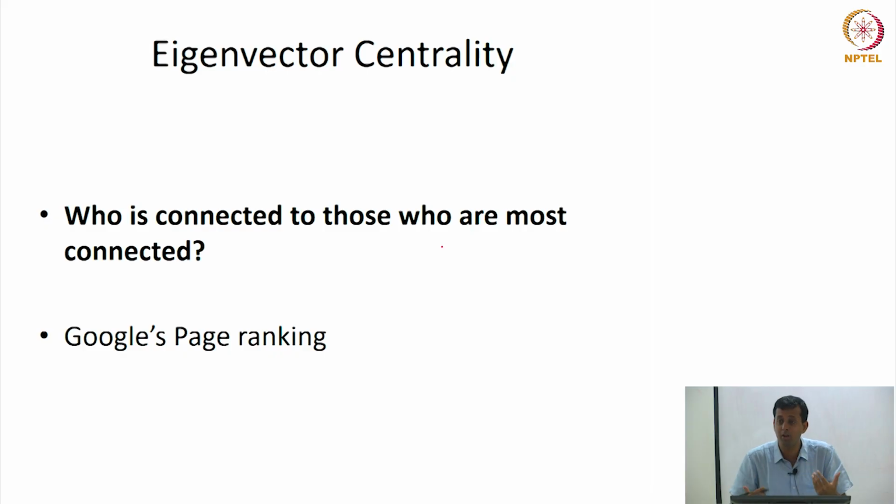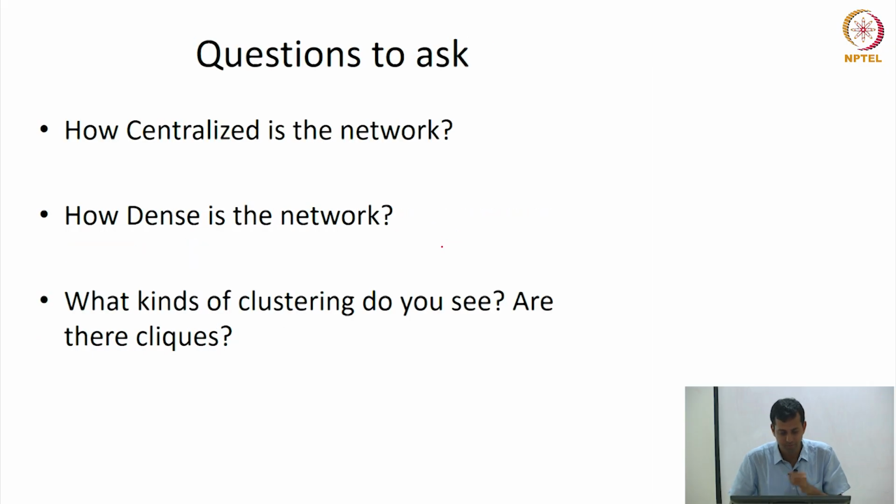But it's very important, because if you can understand this, you understand who to talk to, to influence the network. You have a high power, high interest stakeholder who takes a lot of time and effort to manage. There's somebody else who may not be as high power or high interest, but may be much better connected in the network, and by influencing that person, you quickly influence 15 or 16 other stakeholders. Unless you have this map, it becomes difficult to understand, because you have limited time and resources to influence stakeholders, okay?